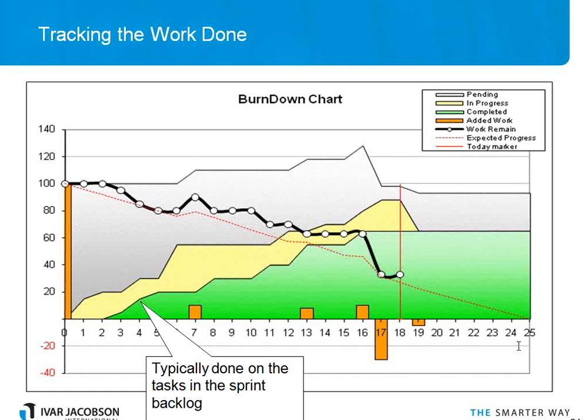In that graph, we probably left it a bit long before we did the descoping, but the idea is that you've seen the scope increase, you've seen our original target, we're looking at the progress. In this case, we firmly believe it's going to be an S-curve, so we've extrapolated, and we're not going to make it all the way up to 650 story points.